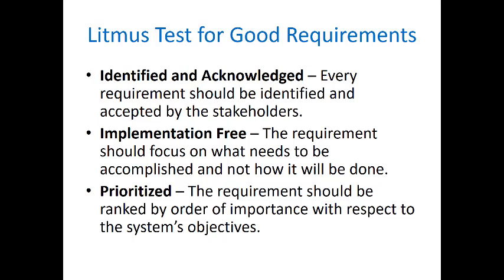So you want to say that as we try to collect data in the bike rental system, we try to send them to the Department of Transportation, and we have to make sure this data can be easily integrated into their system. That's your requirement, but you don't want to mention anything like we are going to use this software or that software. Design independent, implementation free. Just make sure to specify the requirements.